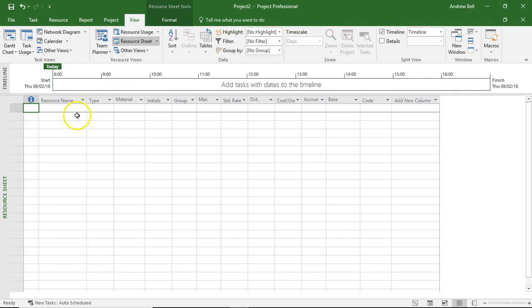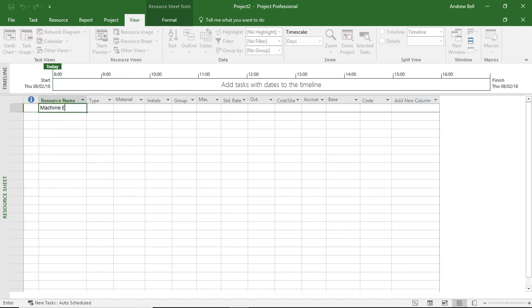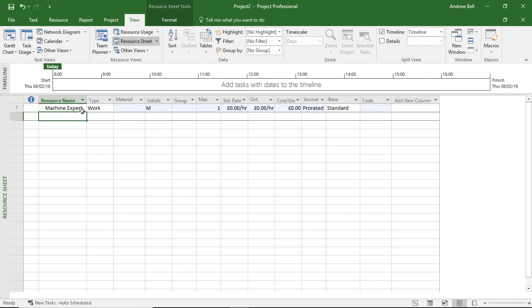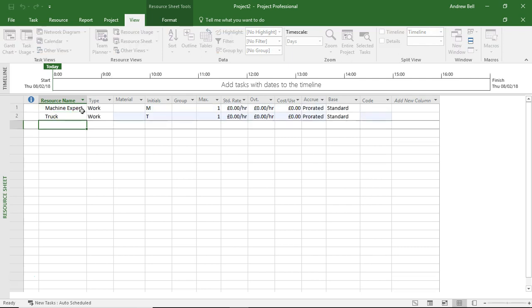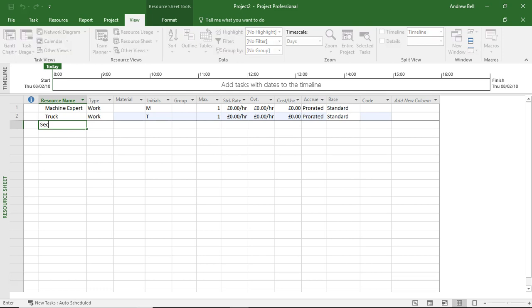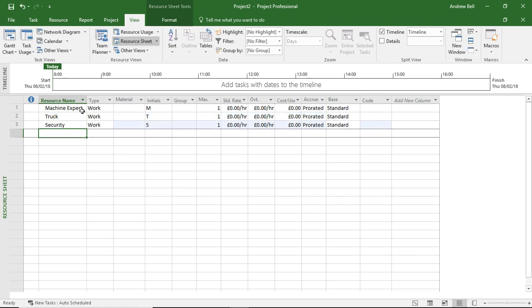I'm going to go to the resource sheet and add in three resources. We've got the machine expert for rebooting the machine, we've got a truck that we require for the transportation, and although we don't need anybody to do the concrete drying, I'm going to put some security on the task so that nobody leaves their footprints all over my wet concrete.